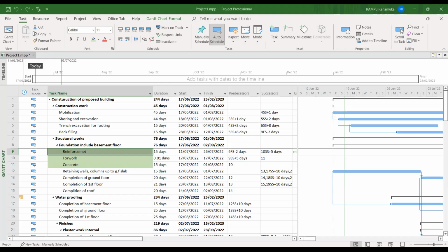If you're telling that in a 2000 square meter ground floor slab, we can't just tell that the second floor will complete in 35 or 40 days. If we have to complete that in 35 or 40 days, we should have a clear breakdown for that. Clear breakdown means how many days for the formwork, how many days for the concreting, those kinds of things we need. So that's why I'm telling you that you have to get that.